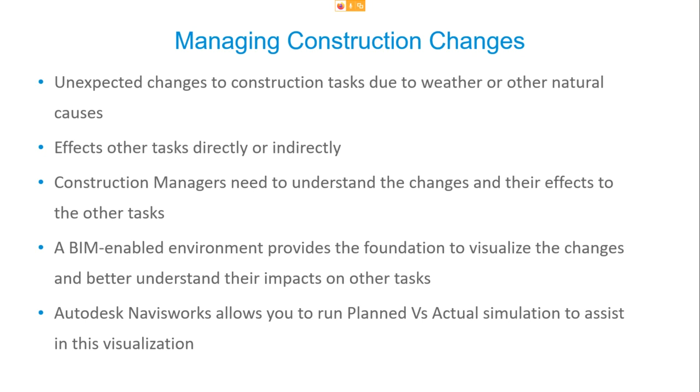The problem is that if you're only looking at the construction schedule, it's really hard to understand and visualize what changes would be applied to the other tasks, or what flow-on effects these delayed tasks would have on the other construction tasks. And this is where a BIM-enabled environment provides us the foundation to visualize these changes. A BIM-enabled environment is where you've got all the metadata plus the 3D model to visualize the project and also the elements in the project.